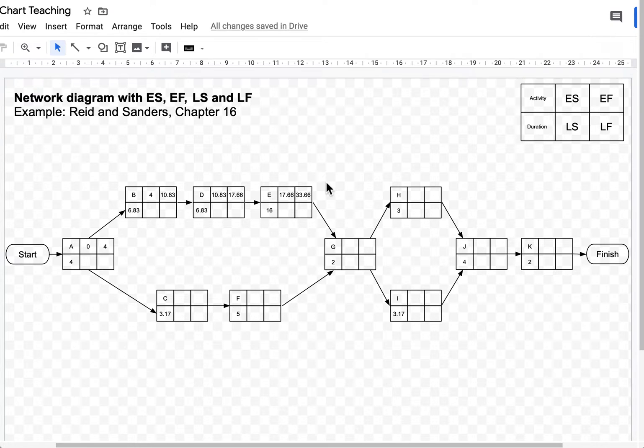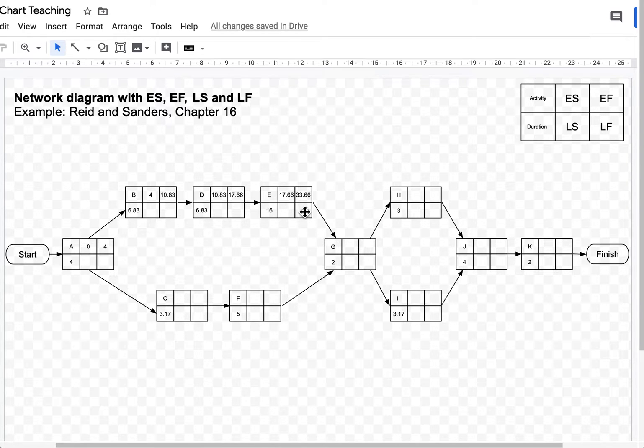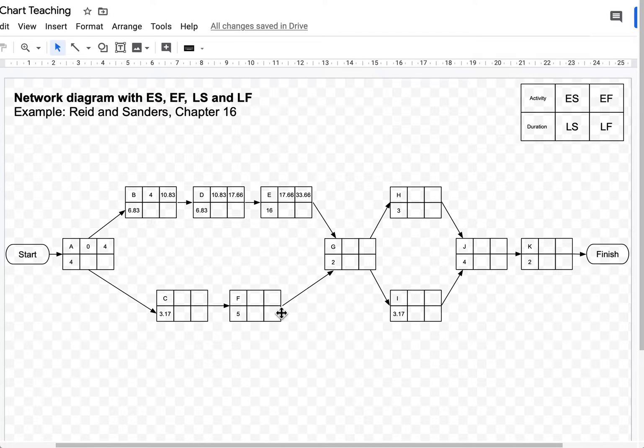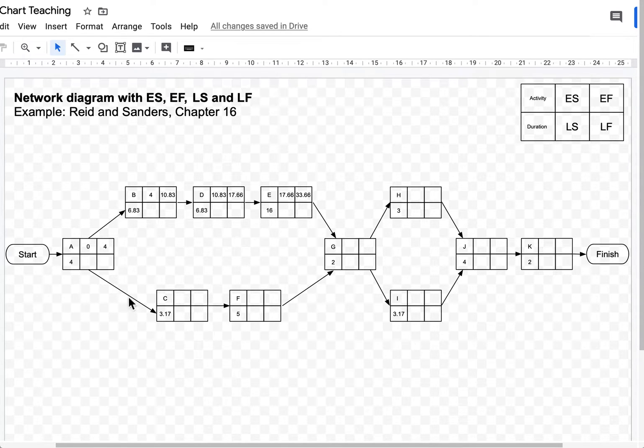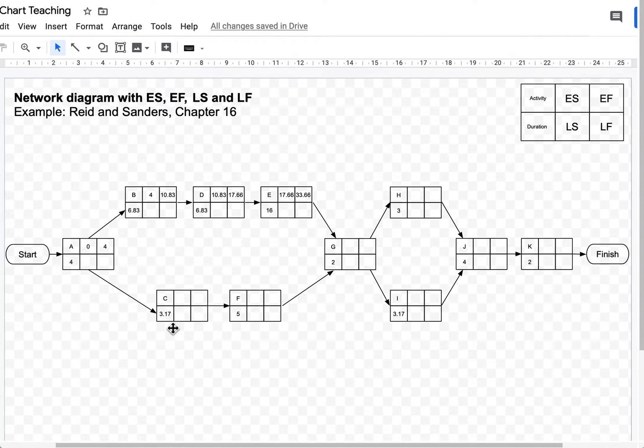Now, hang on a minute. Before I move on to activity G, because activity G is dependent on two activities which are E and F, I first need to complete this part of the network diagram before I decide the earliest start time for activity G. So I'm moving on to activity C.